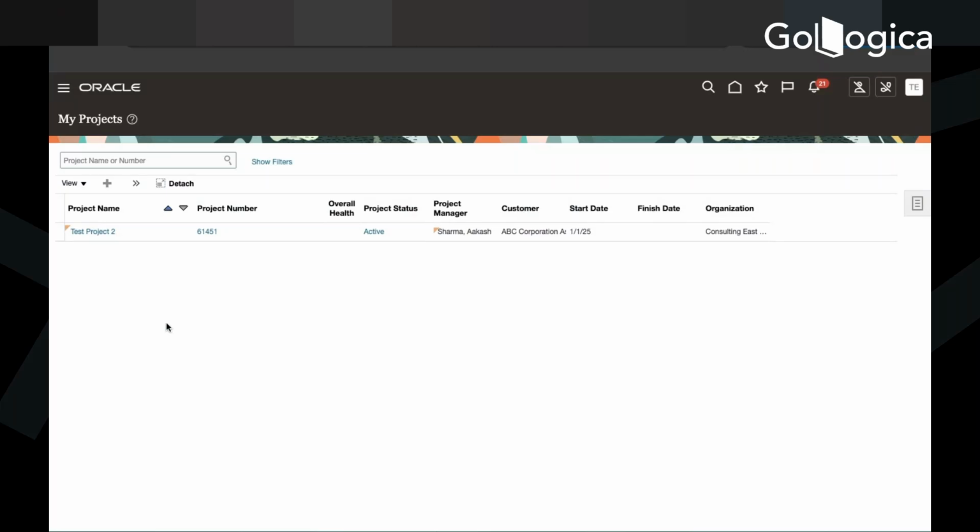How will they add this 1000 rupees? They need a way to add it. In project costing, we call it burden cost. That is the extra burden apart from the actual cost. The actual cost is the raw cost, the extra is the burden cost. So we need to come up with a burden multiplier.